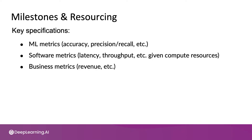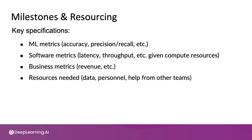And if possible, you might also write out estimates of the business metrics you hope to move for the project during scoping, such as how much incremental revenue, if you have a way of estimating that.